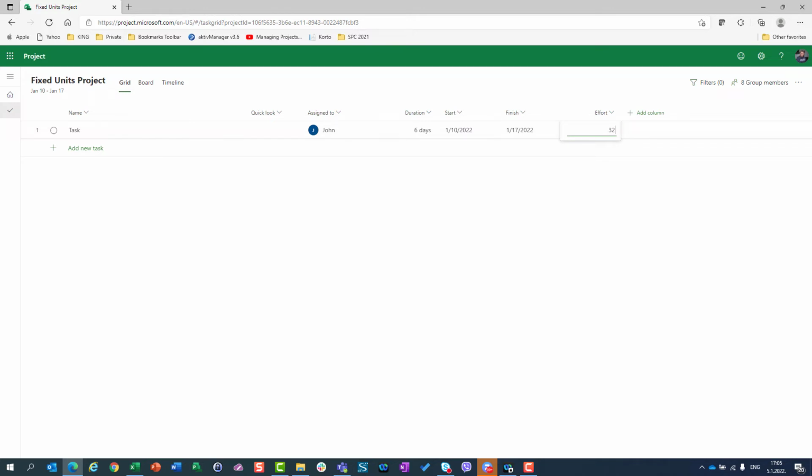On the other hand, if I change the effort to 32 hours, I will have 32 hours divided by 8 hours per day for John, and the duration will be shortened, so it will not be 6 or 5 days, but 4 days, because we are talking about a fixed units project.